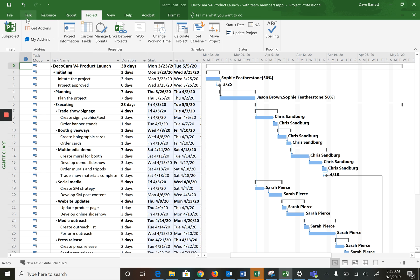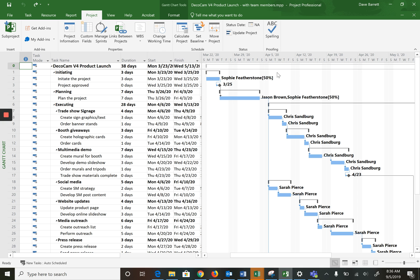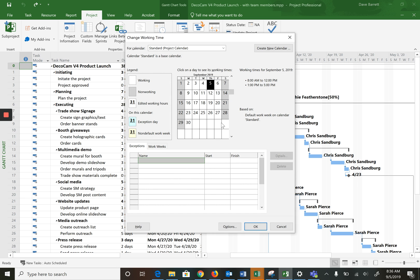I'm just going to undo that and switch it back. Notice the schedule reverted back — we now have a five-day work week. Let's say, for example, we want Monday April 6th to be a statutory holiday for this project, so we don't want to schedule people to work on that day. We can change specific days. First of all, we need to move ourselves to that month.